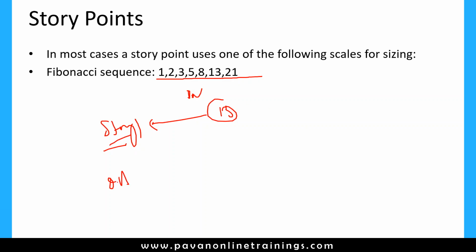Similarly, from the QA point of view, QA people will also give an estimation for the same story. QA activities are different and dev activities are different. Sometimes the developer will take a lot of story points, but QA will take fewer. And sometimes the developer may need fewer story points, but QA tasks are very high, and QA will give a lot more story points.